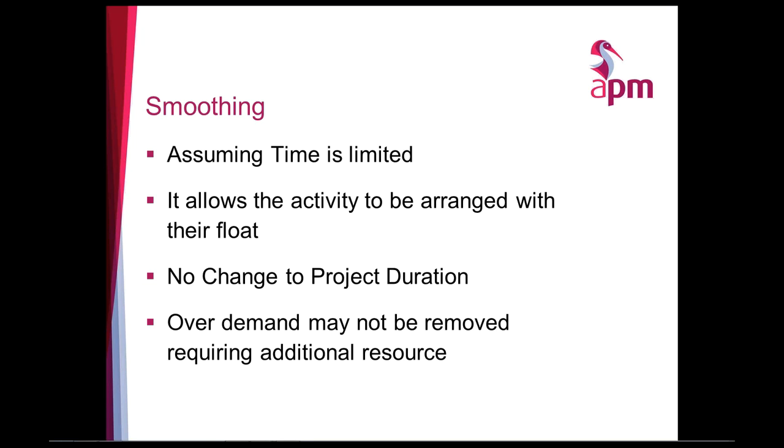Okay, what you have to then do is be a little bit creative, and on those days where you need additional resource, you have to get people working overtime, for example, or you have to hire people in for short periods of time, then you release them. In Sellafield, we use agency supply workers for that. So if we've got a short period of time where we require additional resource, we'll bring an agency person in. At the end of that, they'll then be released.